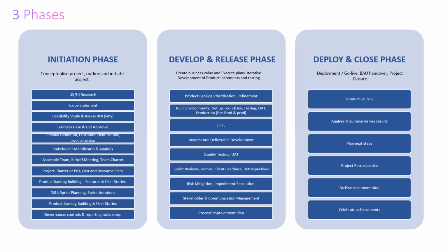Now, when we do our product benefit review, you would have done your research and your homework, and you want to project to the business that after 6 months of the launch of this product, you would make XYZ amount of money, or you will gain XYZ amount of customers, or you will retain XYZ amount of loyalty.